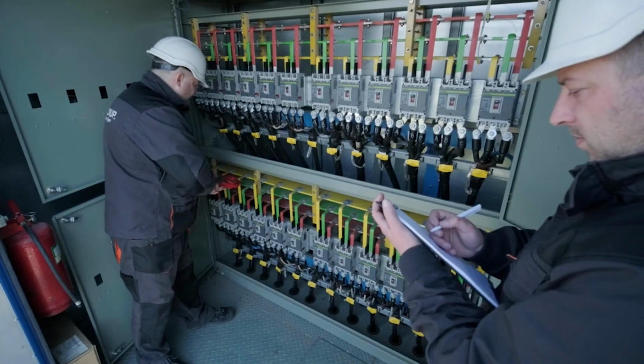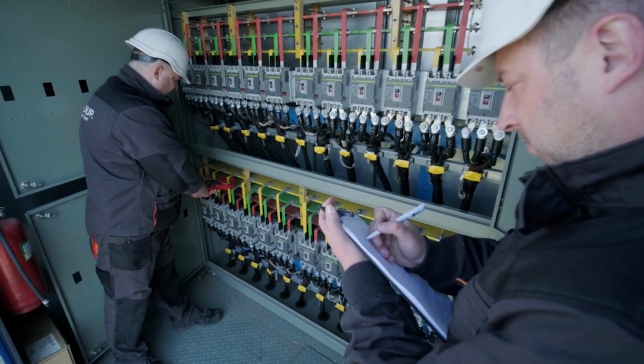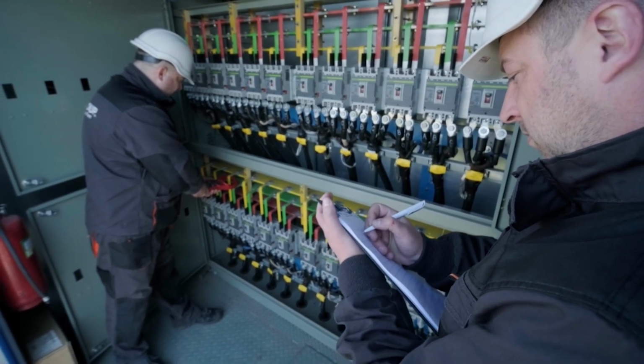If this is the approach, commissioning will take much longer than necessary and many things will get missed. Instead, a complete commissioning staffing plan needs to be prepared in advance, identifying the skill sets required and how senior individuals can provide guidance to the rest of the team. No early involvement of the commissioning team in earlier phases of the project. If the commissioning team only becomes involved in the project once on-site testing starts, all they can do is identify problems that will cause delays rather than proactively addressing them earlier.